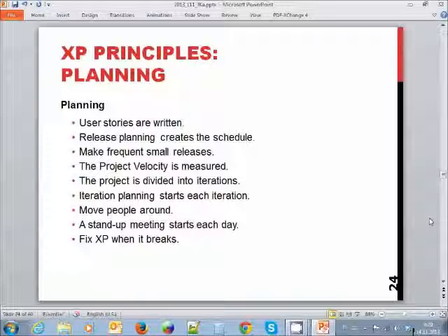Although, on the other way, if people are complaining that we can't keep our deadlines, people are working through night and day because these deadlines or feature requirements for the iteration are too complicated, then we can just spread out the objectives or give people a couple of days more to come up with the implementation.